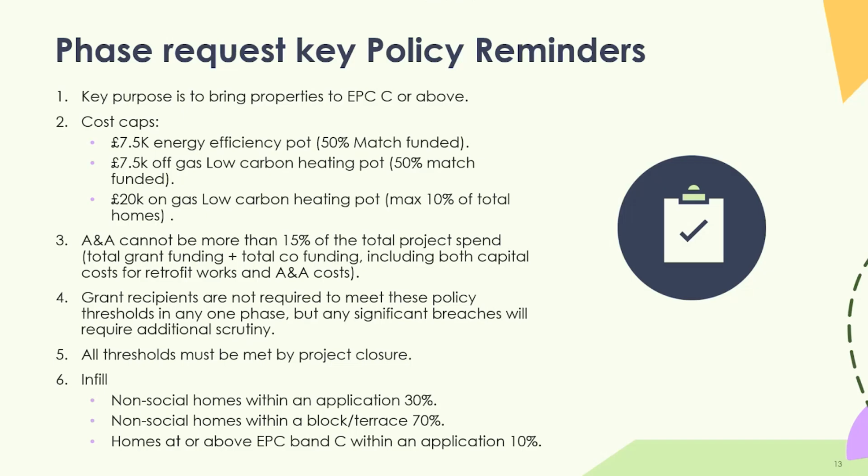As long as, again, you're able to justify that, these are higher costs for this reason in this phase. However, all future phases are lower cost measures, let's say cavity wall and loft top-ups, and therefore, we're going to come below the cost caps by project close. Again, that's fine. And depending on the level of that, it still might escalate to the department just for them to have their final say. But in reality, as long as you're able to adequately justify it, there should be no issue.